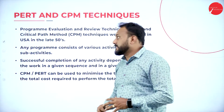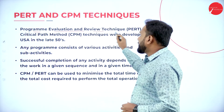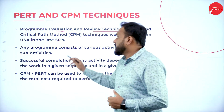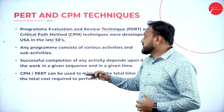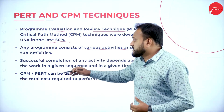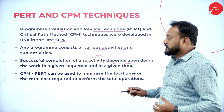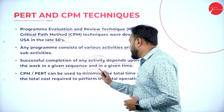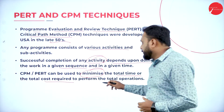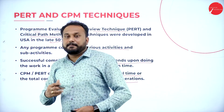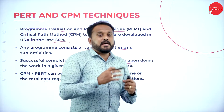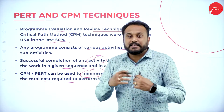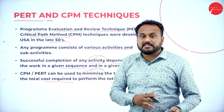Then we have PERT and CPM. PERT stands for Program Evaluation and Review Technique, and CPM means Critical Path Method. These techniques were developed in the USA in the late 1950s — specifically 1956 to 1959. Any program consists of various activities and sub-activities, and successful completion depends on doing the work in a given sequence and in the given time. CPM and PERT can be used to minimize the total time or total cost required to perform the total operation. I will take a separate session on PERT and CPM to manage time and cost.